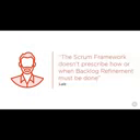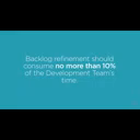After Alan's explanation, both Dave and Louise step to the front of the room. Louise begins. Unlike the other Scrum ceremonies, the Scrum framework doesn't prescribe how or when backlog refinement must be done. It only specifies that the practice should occur and gives a guideline that it should take no more than 10% of the development team's time within the sprint.